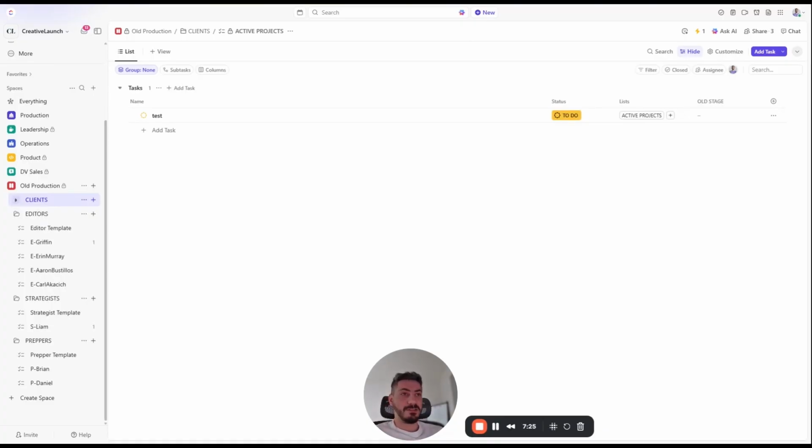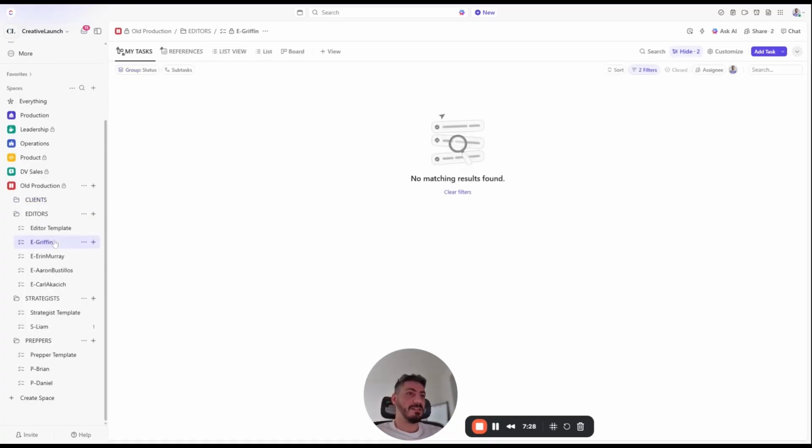You need a separate place. The solution they came up with: creating a list for each person. But this is not scalable, because if you create a task in one place and you don't create it in the other place, you lose the connection. Because of that, tasks will slip through, projects will be lost, and people will not know what's actually going on down the pipeline. The whole system worked at the start, when you have a small team of a couple of people, but when we started scaling, this actually broke because the whole connection maintenance was a headache.